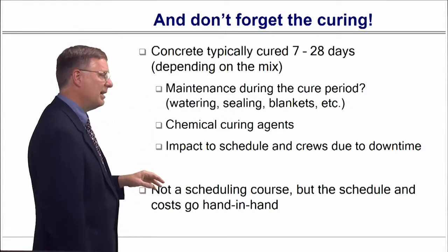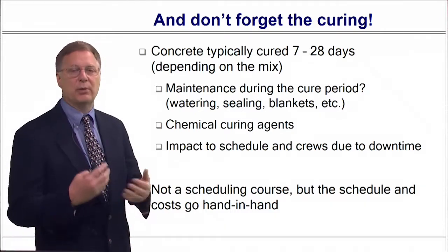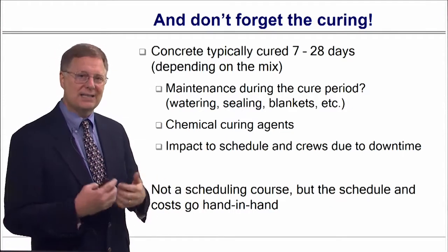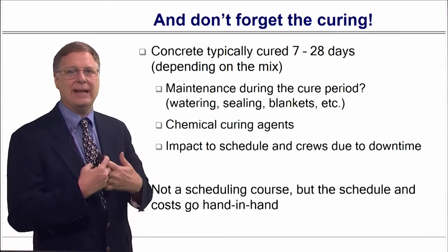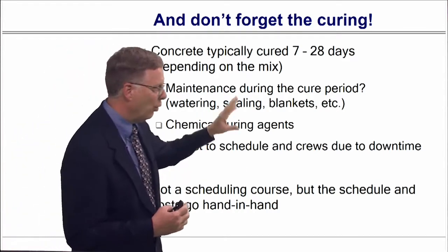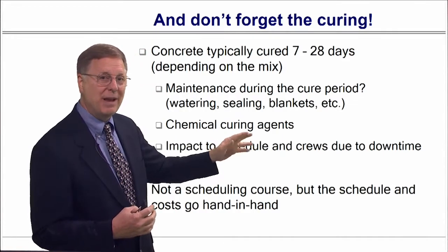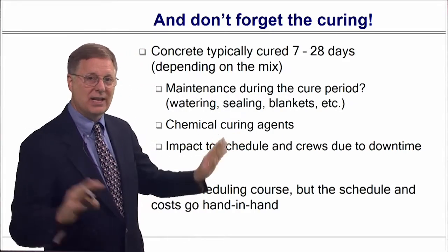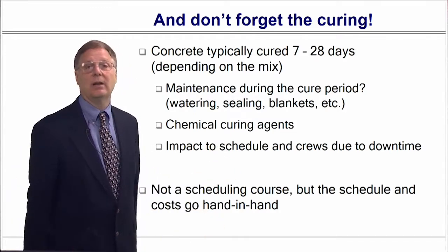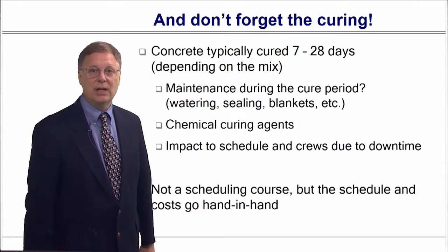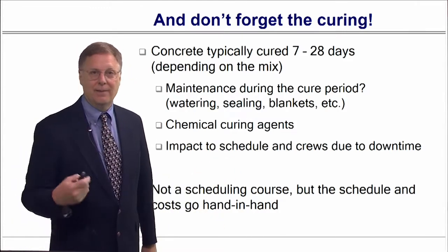So again, this is not a scheduling course. We're not dealing with how you come up with a schedule, but I want to emphasize that the schedules and costs go hand in hand. And this whole dynamic can affect your costs because there may be time in the schedule where the contractor just has to walk away from the site and say, we're waiting on the concrete. In which case, you're paying money for no work.